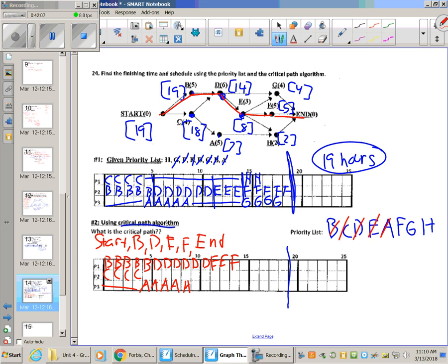Okay. So moving on to F. F only has one prereq, and that's E. So it's got to be past E. So again, that would be past hour 14. I don't know, just keep it with P1. Maybe keep the gap closed. Sure. So that's a processing time of 5. And if you notice, I end at hour 19. So P1's done. Stop assigning stuff to him.